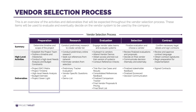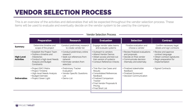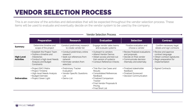There's prep work to assemble the team, determine a timeline, and set expectations. The main deliverable is the needs analysis that will guide the evaluation later. From there we'll begin researching different vendors and produce a shortlist that will proceed to demos and evaluation. Next we engage the sales teams and do a deeper evaluation of the technology, filtering down to a final shortlist. Finally we finalize the evaluation, make our selection, and move on to contracting and prepping for implementation.